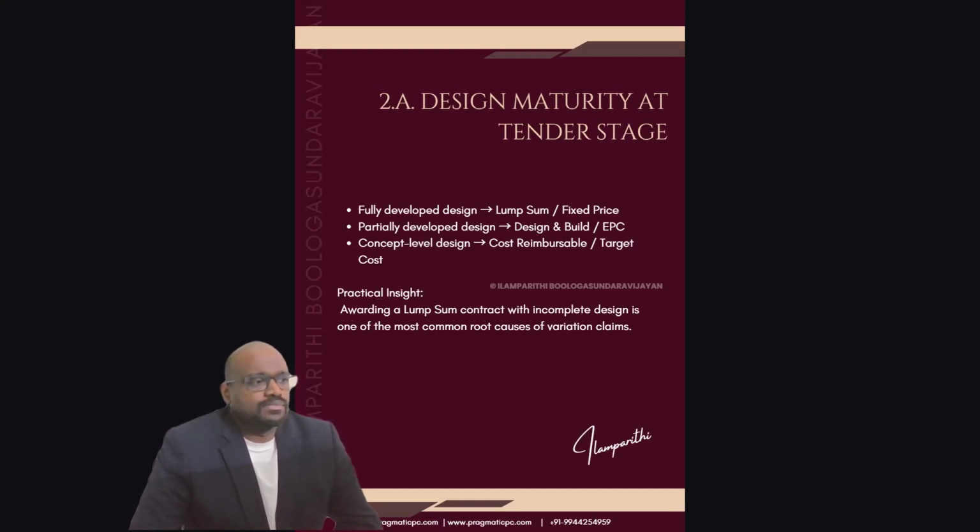So awarding a lump sum contract with an incomplete design is one of the worst decisions you can take, because the contractor may come up with scope deviations. When the detailed engineering is developed, it might end up with so many variations which you could not have imagined.